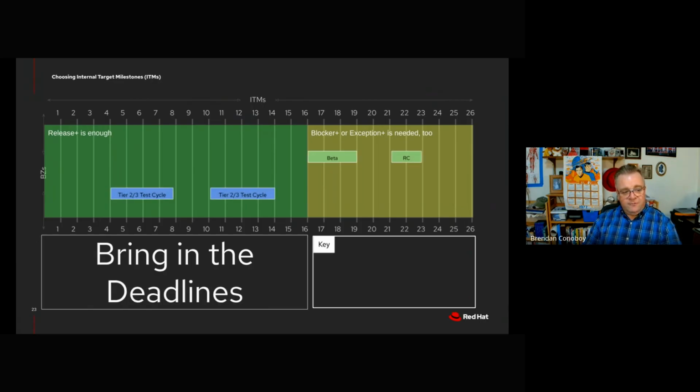When we're doing development for RHEL, there's a period of time where any pair of developer and QEs can make a change in their technology area. But there's also a period of time where it's late enough in the release cycle that we needed to have administrative oversight to ensure that the change they wanted to introduce wouldn't have a cascade effect elsewhere into the distribution that couldn't be managed or caught by things like our CI systems.